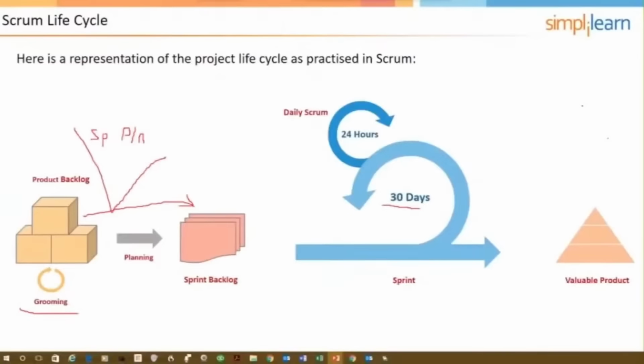There will be a daily scrum, like we did at the beginning of our workday together as our team. And then at the end of the work of the sprint, there will be the sprint review. The sprint review meeting or ceremony is also time-boxed, and it is time-boxed to 1 hour for each week of the sprint. So if we're doing a 4-week sprint, the sprint review meeting would be 4 hours in length.